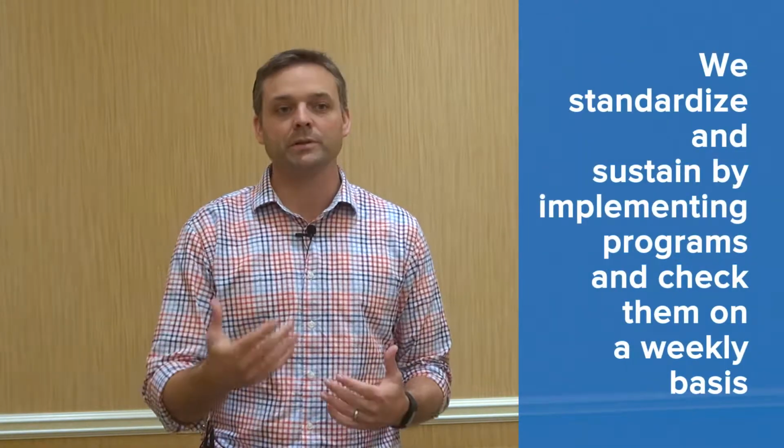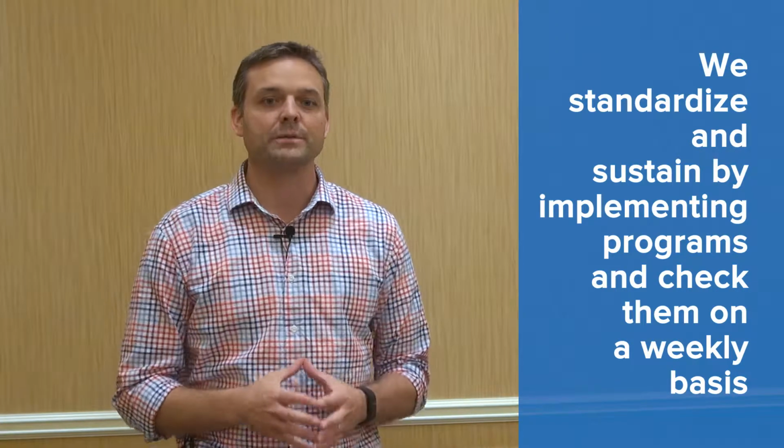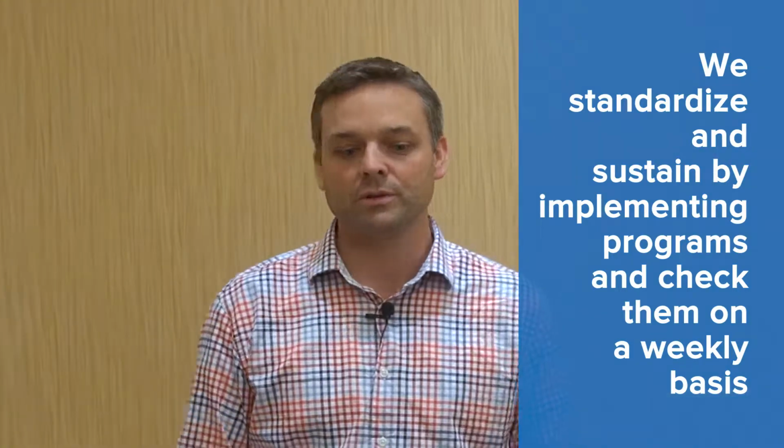And then again, we standardize and sustain it. We've implemented programs where on a weekly basis, we meet with craft workers and different groups of craft workers on job sites to understand what we are seeing. We've got a standardized plan of site logistics now. To sustain it, we're meeting with these folks to ask them, what's bugging you? What are you seeing that we could do to help improve the site? That really helps sustain and improve it, because we're checking in on a weekly basis with the people that are actually encountering the obstacles on the site, so that we can implement things really quickly and fix that logistics plan. So that's where we primarily use the 5S process as we're on a construction site.